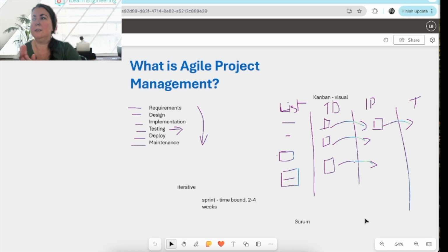And then we have something called Scrum. Scrum is almost like, in a way, a halfway house between waterfall and Agile. We have the flexibility of Agile, we have the iterativeness of Agile, but we have very defined roles in Scrum. So we have certain size of teams. We have a Scrum Master who organises things. We have specific times for our sprints. We always do sprint planning on a certain day. We always do a retrospective on a certain day.